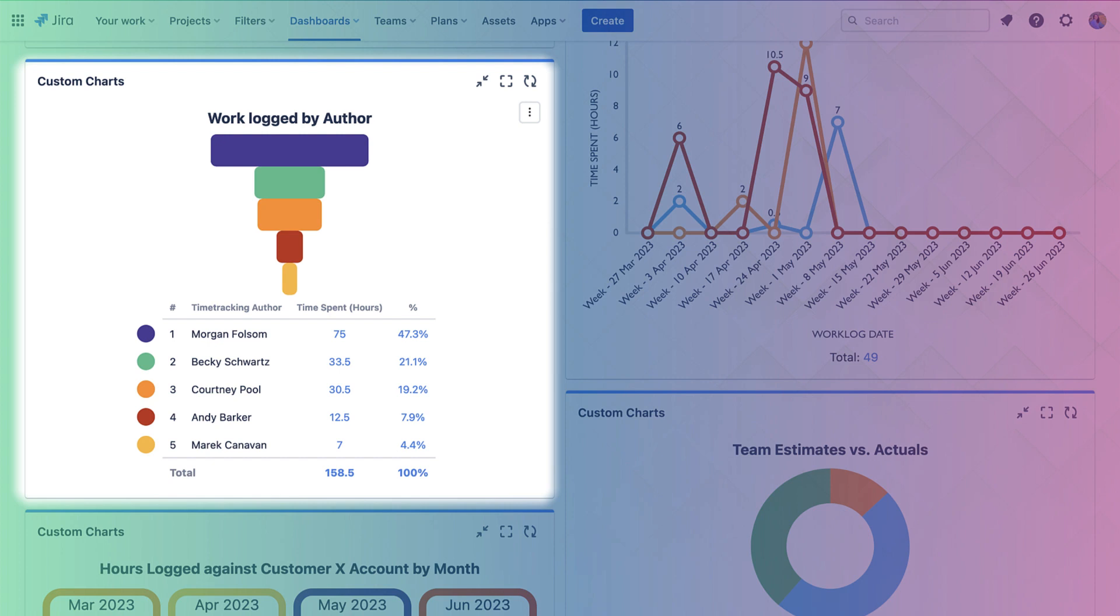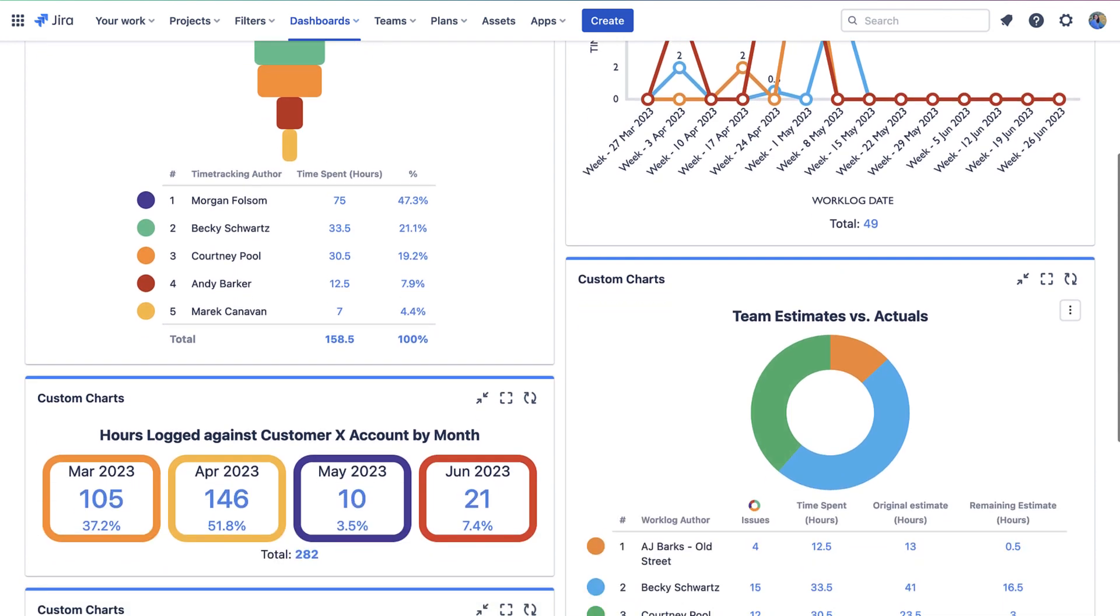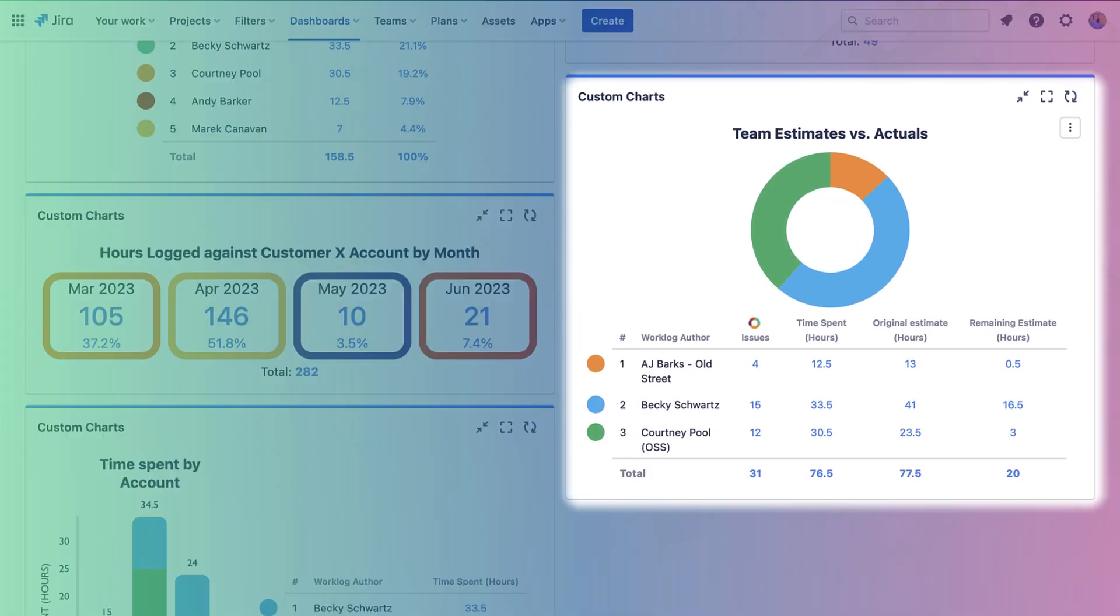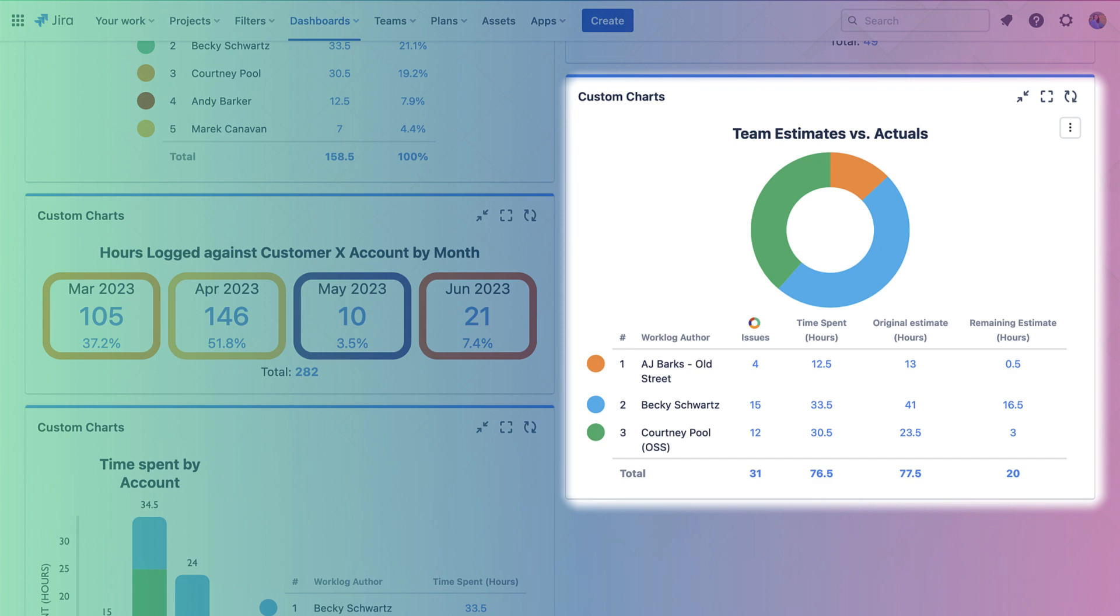This Custom Charts pie chart is showing us the time we estimated we would spend on our work versus the time we actually spent on that work. We have it broken down by the person who's tracked their time or the work log author. Using this chart, we can understand how much time is left on our original estimate, if we're going over our original estimate, or if we're going under that original estimate. This helps for better planning of work in the future and better resource allocation.